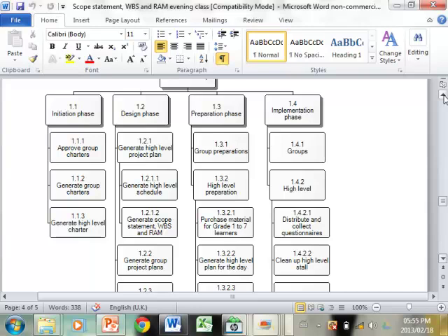You understand? And that becomes confusing. This is a small project, so maybe it's not that important. But with huge projects, the important thing during the work breakdown structure phase is not to sequence, it is to identify the work. Yes, to check what is inside and what is outside. What is the work that must be done? And that's all that we worry about in the work breakdown structure.